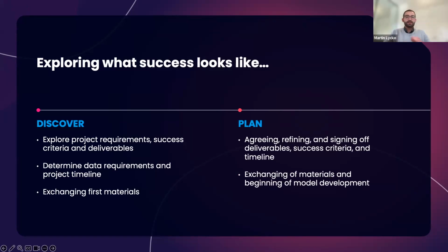Thank you. So sit down with them again a week later, agree and sign off those deliverables, make sure there's nothing that we misunderstood or that might be missing from them. And just to make sure we're all on the same page about what they will get after a 4-week iterative development process. And because we're doing these two things 2 weeks apart, if there are additional data requirements, then people normally have a first idea of where to get that data from, or might even have it ready so we can straight away start generating that digital twin.